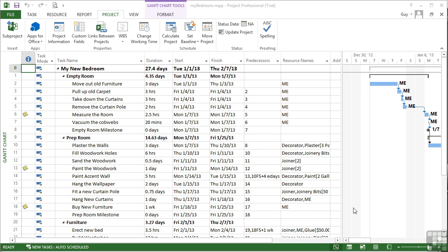Otherwise, you might find that you plan your project, it hits a bank holiday, and your project plan is thrown out because you haven't built into your calendars the fact that nobody will be at work. So if we wanted to add in public holidays, the best place to do this will be into the standard calendar because all of your work resources are, for the moment, based on your standard calendar.